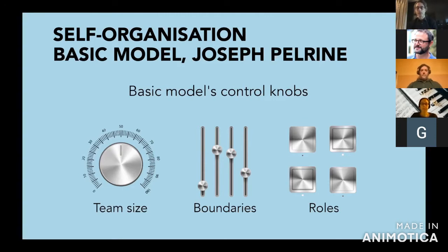But the interactions between people inside the team and people outside are less frequent and less intense. And then roles. Roles have the power to activate different identities, like being a father, or being a team member, or being a football player. Different roles activate different identities, and so changing the roles activates different identities that lead to potentially different behaviors. Let me give a practical example. Scrum breaks down the project manager role and replaces it with two different roles, Scrum Master and Product Owner, in order to try to create different behaviors and different ways of acting.